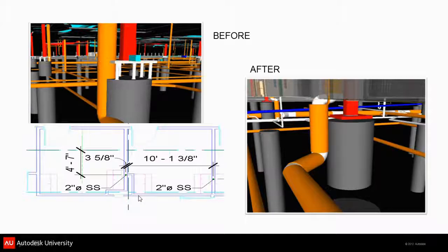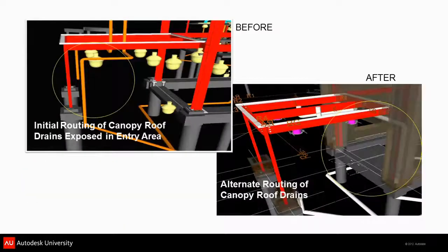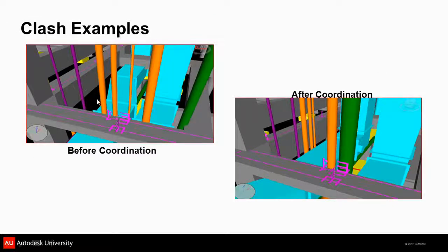I mean, a lot of jobs, when we're working construction side and we get firms that are new to modeling, this is a very frequent one: roof drain, fur outs, things like that. Entry areas, these entry drive ports like outside buildings, are probably the last thing to get designed because it's, you know, gingerbread dressing. It's the icing on the side of the gingerbread house, and no one thinks about that. And these are coordination areas that can affect plumbing. Frequently, we'll see the drains on these get done as an afterthought.